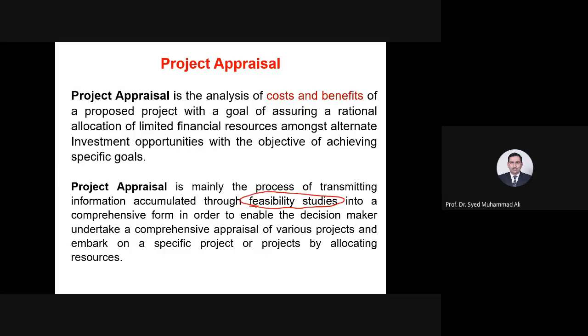In order to appraise a project, certain studies are required. If you have a PC1 prepared worth 1 billion rupees for a road from Charsada to Mardan, some new road, for example, there should be certain feasibility studies, certain surveys should have been done, certain engineering design should have been done, design calculation should have been done, and then somebody is going to review it.